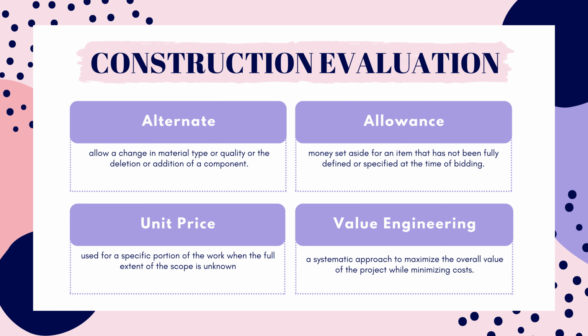Once the base cost is determined, a change order is submitted to adjust the contract sum accordingly. So, it may not be exactly how much the allowance was. It could be a little more or a little less, and then they'll use a change order to adjust the contract sum to that amount.